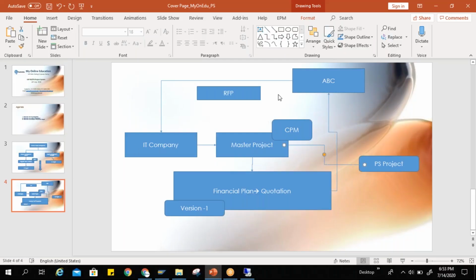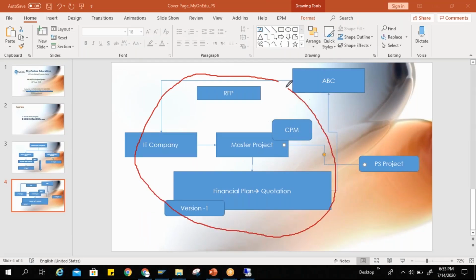Whatever we have discussed and prepared in the estimation, that same amount you can transfer into your PS easy cost planning, CJR2, or network costing. You can even create an object from CPM to the PS project directly. So this is the integration point. For that, SAP has given the concept of object link, the same way we process the integration in the PPM system also.